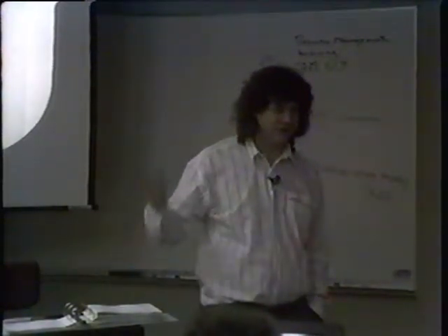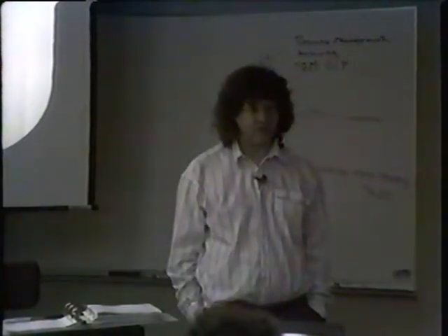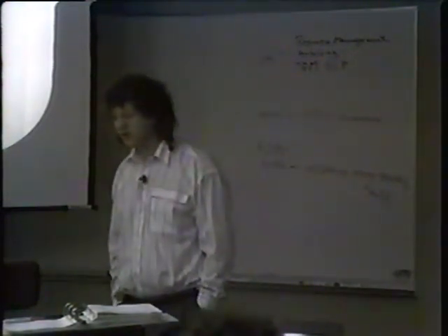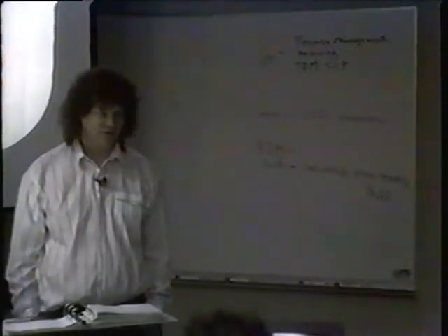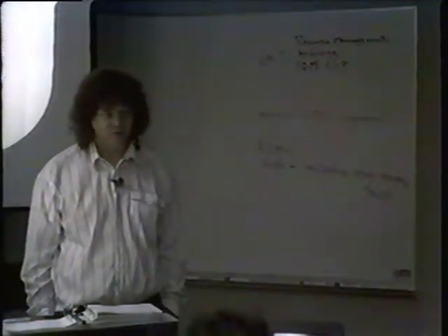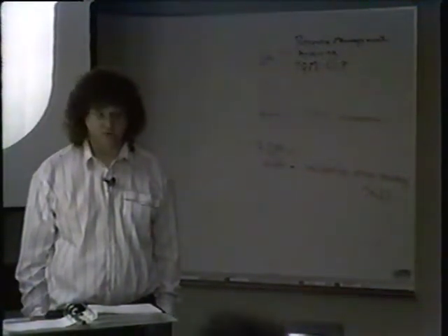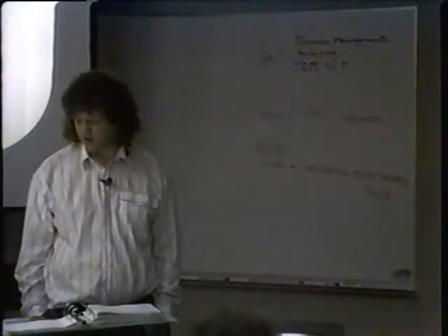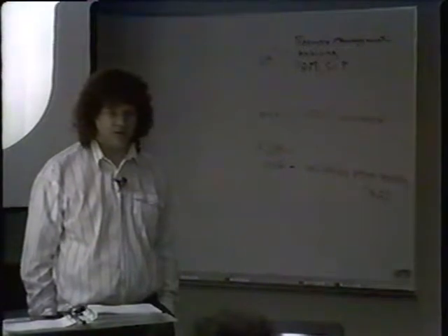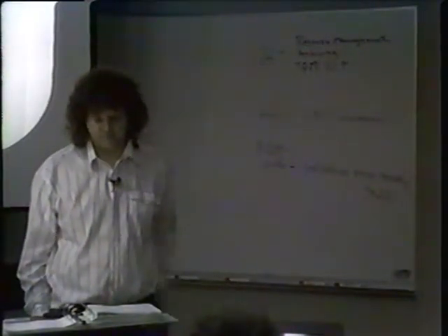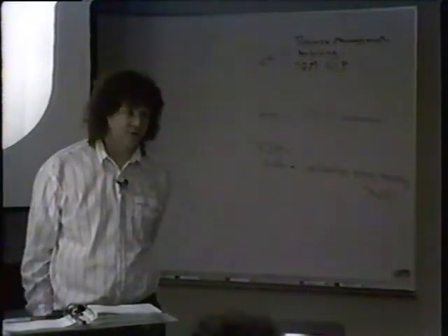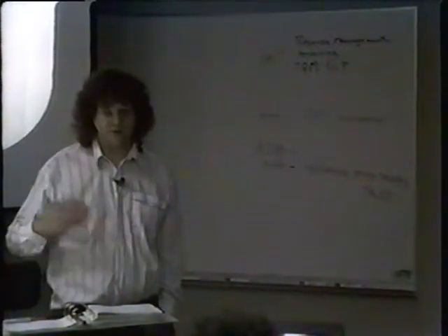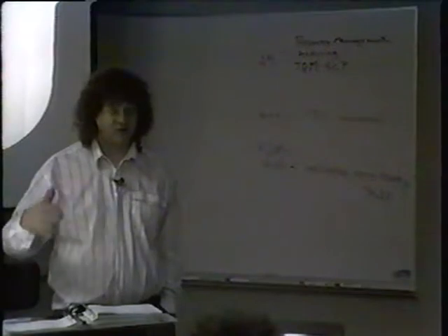Migration is really a training problem. It's really just a brainwash situation. Scrub their heads clean of everything they know about COS and teach them UNICOS, a Unix-based system. And it's easier to teach a Unix person a UNICOS system than it is a COS person a UNICOS system. This is true for analysts and that sort of thing as well. So training for the CRA staff should really begin as soon as possible, a year, 2 years before installation.